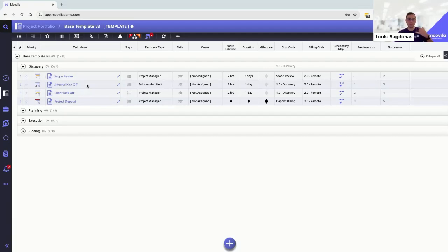You call up pre-sales and say, hey, we got to go to the customer for a change order. We've blown our budget out of the water. And they're like, well, I don't want to call the customer. I don't want to go back and do that. You say, well, they told us it was 200 users. It's 500 users. They've got emails and people using the different applications and platforms all over the place, right? We're clear on that internally.